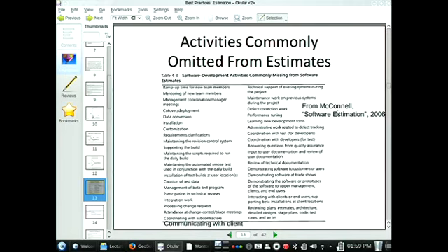Typically in real-world projects, after they are brought to a feature-complete state, after they are deemed worthy of user deployment, there's actually a significant process associated with pushing it out to the user, getting it onto the user's infrastructure, and the cutover process, bringing the users from the old system to the new one, which may involve bringing over data from the old system into the new system. Data that was used in the previous system now needs to be read into the new system. And that can have lots of gotchas associated with it. There's risks. Data conversion things.